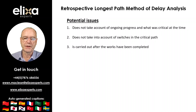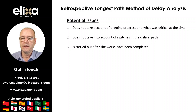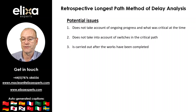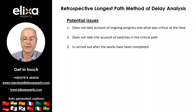Since the retrospective longest path is identified at the end of the project, it is less helpful during the project as parties have to wait until the works are complete before conducting such an analysis. To this extent, it does not provide an early warning of delay to the project at the time.